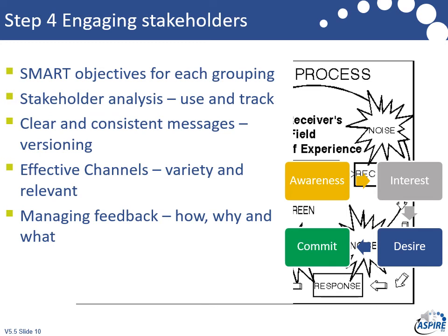Now, when we're thinking about delivering messages, we need to think about an acronym called AIDA. We need to understand where they are. So there's 4 steps: awareness, interest, desire or commitment, and action. And we need to think about which one they are at when we're delivering the message. So there's no point in trying to get them to commit to something if they're not aware. So you have to take every communication with all stakeholders on that journey. You make them aware, you gain their interest, you get some desire or willingness to engage, and then you get their commitment. Something really important. It's the AIDA model when you're delivering communications, to make sure you're pitching it at the right moment in the right way.